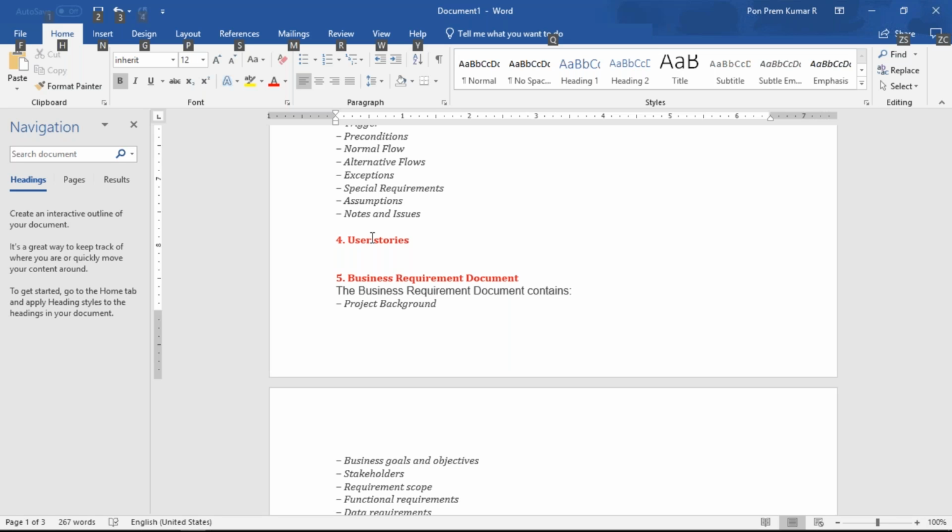Once after successful completion of the transaction, the order has to be tracked, a mail has to be triggered to both the client and the end customer who purchased the product, and delivery also has to be tracked. I'm just sharing a very few, four user stories. An e-commerce web page will have close to a minimum of 50 plus user stories. Home page is a different user story. Then backend is another user story. In backend, we can divide the concept into multiple user stories.